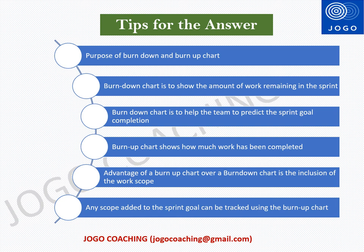Burndown chart helps the team to predict the sprint goal completion based on the current progress. Burn up chart shows how much work has been completed and the total scope of the project. The advantage of using the burn up chart over the burndown chart is the inclusion of the work scope — any scope added to the sprint goal can be tracked using the burn up chart. Burndown chart gives detailed information; burn up chart gives high-level information. Burndown chart tells how much work is left; burn up chart tells how much work is done.